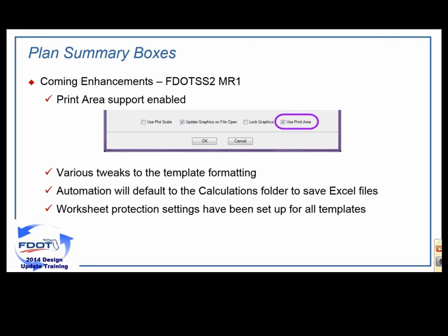That leaves everything that construction may use, which is those final columns, the construction remarks columns, as well as the final backup worksheet. All of that has been left open so they can make whatever changes, but anything that has to do with design is now locked.